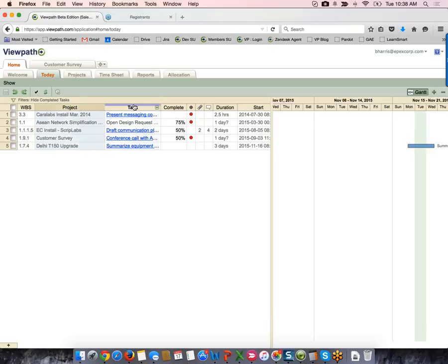So you can see the project name in this column, the task name, and then from this spot you also have the ability to update the percent complete. Logitech is doing a 0, 50, 100% set completion level. So 0 if it's not started, 50% if it's in progress, and 100% once it's been completed. And you can see once I mark a task 100% complete, we've got a line that's drawn through.